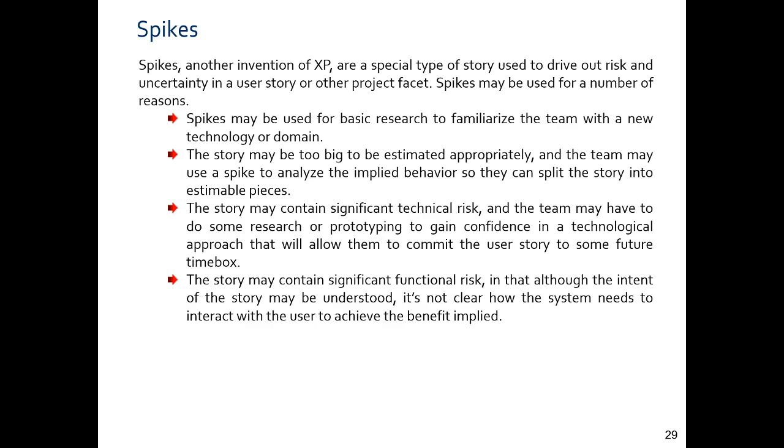So spikes. It has been derived from XP. Spikes are a special type of story used to drive out risk and uncertainty. They are used for basic research to familiarize the team with new technology or domain.